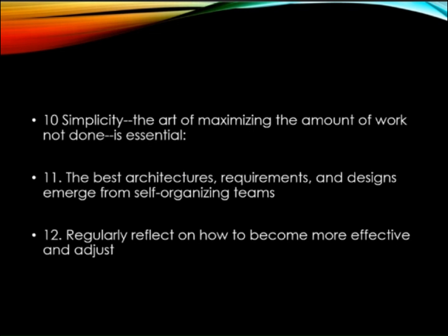And now our 12th principle is reflect regularly and adjust behavior. After each sprint, review what went well and what did not. In the retrospective meeting, the team decides to improve estimation after missing a deadline in the last sprint. So I hope you understood all the 12 principles.